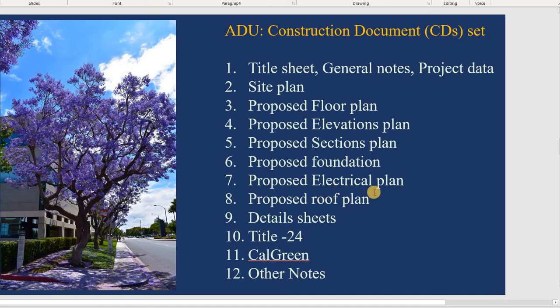After that, you need to show me the roof plan. The roof plan shows me how much you use for the roof, the ridge beam, roof rafter, ceiling joist, hip if you use the hip roof, anything else. Let me see. Even shear wall on the roof plan, to show me the slope of the roof, something like this. And I also need an electrical plan to make sure you hook up what kind of light and outlet you design in the floor plan.